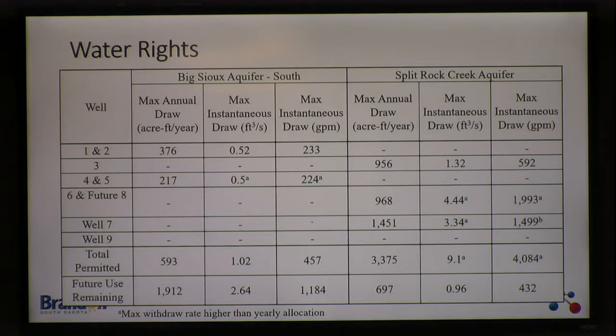Okay, so the point is that it's recognized in the state, and it's well understood that when you utilize groundwater sources, you have to engage the DNR water rights program. And so they would need to do that regardless of well number 9 being explored, and we don't have a license or a permit for that well in terms of its final water right. You know, there's a process whereby that goes through.